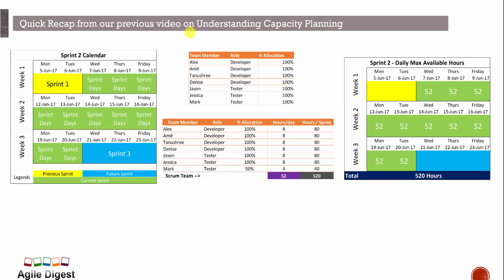Assume we have 10 days of sprint starting on 7th of June and ending on 20th of June. Every day we are doing our daily standup, and before starting this sprint we are doing a sprint planning. We have seven team members: four developers — Alex, Amit, Tanushri, Denis — and three testers — Jason, Jessica, Mark. Allocation is 100% for all except Mark, who has 50% allocation. Default working hours is eight hours for everyone and four hours for Mark.